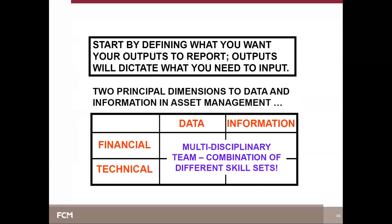Here's a simple example to clarify inputs, processes, and outputs: you have a truck bought three years ago in 2016, and trucks in your municipality last eight years. The known data — today is 2019, acquisition year 2016, estimated useful life eight years — are the inputs. The calculations: the truck is three years old, 2016 plus eight is 2024, remaining useful life is five years. Those calculations are the processes. The replacement year 2024 is the output.